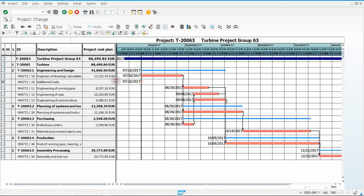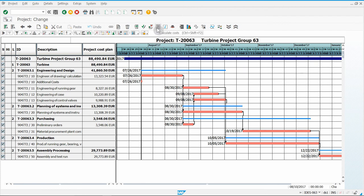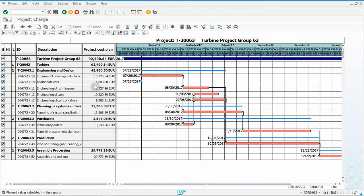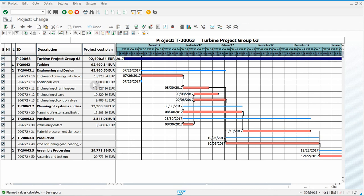Make sure this column is displayed so we can see all the numbers. You'll notice 4000 is not yet listed, so we have to recalculate costs. Click Select All so everything is selected, then go to the little calculator symbol and click it to calculate your costs. If a box appears asking to reschedule, click Yes. Now we can see 4000 here. Take your screenshot showing the project name, the Additional Costs activity with 4000, and your username.